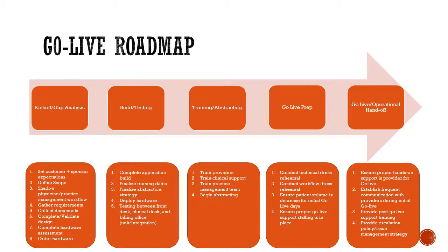In our next phase, which is the GoLive prep, we want to have actual dress rehearsals: a technical dress rehearsal where your system is shown to be adequately printing, for instance, and you have results coming in from ancillary systems and other interfaces that are set up and tested very well. And also you want to have a workflow dress rehearsal where all the providers and all the clinical management team members are actually using the system in preparation for the go live date and moving forward.